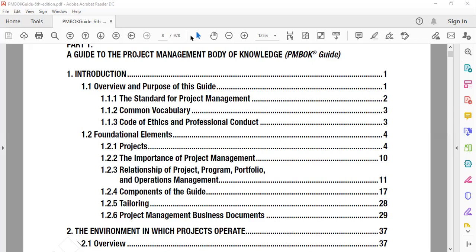In the business case, we mention the business needs, the reason we are doing the project: to increase something, to extend something, to acquire something, to upgrade something, to maintain something, for servicing, for shutdown, and so on. The reasons could also be government regulations, technology requirements, or customer requirements. The benefits management plan contains the financial benefits, benefit owner, assumptions, constraints and risks, plus the strategic alignment, how it aligns with my organization's strategy, and the metrics with which we will measure our performance.